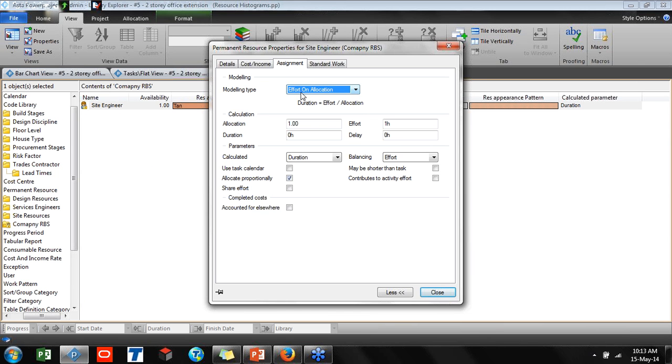When you are looking at our modeling types, non-model, I can recommend you to use in some parts of the project. And if you are looking for more profit in the project, you can model and you can have a more realistic schedule. And when we are looking at effort, it means man hours or machine hours and work on a location. And if we know the amount of the work, we can use this modeling type, and we will make the samples.